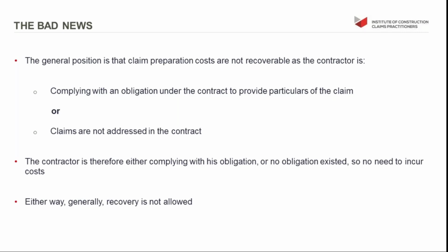Or you'll find that the contract doesn't require you to submit claim documentation and will instead have provisions along the lines of submit your claim and then maintain sufficient records for the contract administrator to be able to ascertain your entitlement.